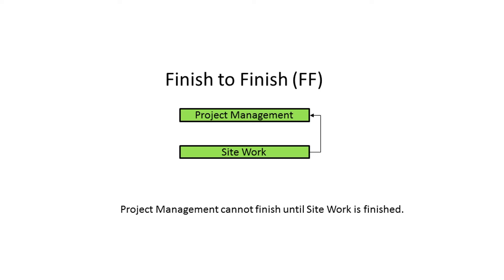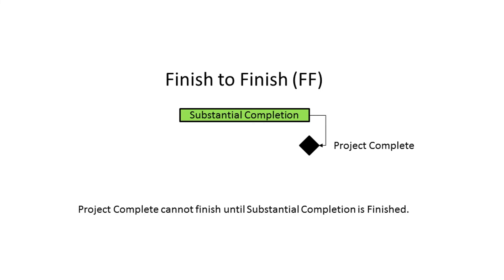Again, this is a reasonably common relationship type and in P6 is often used to link finish milestones. For example, the project complete milestone cannot finish until substantial completion is finished.